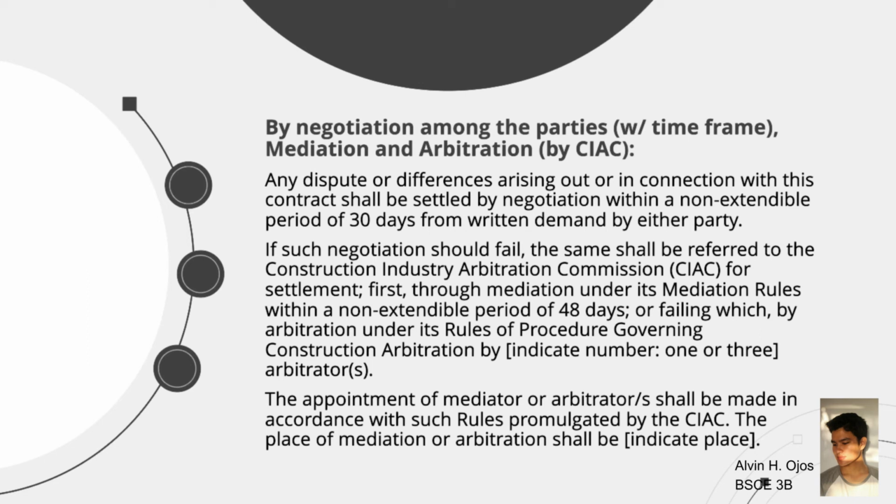mediation under its mediation rules within a non-extendable period of 48 days, or failing which by arbitration under its rules of procedures governing construction arbitration by (indicate the number of arbitrators), and the appointment of mediator or arbitrators shall be made in accordance with such rules promulgated by the CIAC. The place of mediation or arbitration shall be indicated.